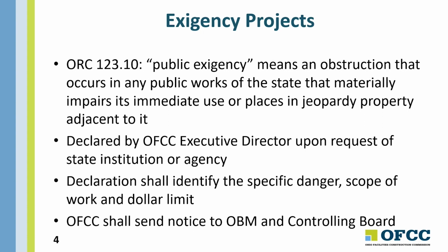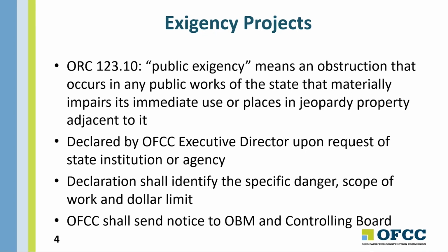So if your institution has an urgent need or an exigency that you think rises to the level of 123.10, you would make a request upon our executive director, and then they would make a declaration, and that declaration identifies the specific danger, the scope of work, and the limit of the amount of that exigency.